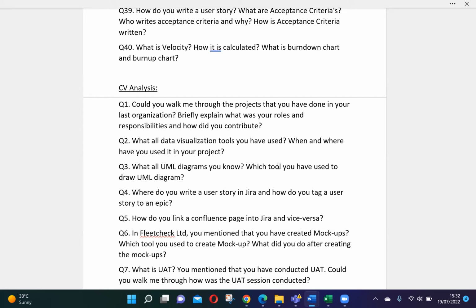Suppose your backlog is ready with 100 user stories, but after a few sprints, customers come up with new requirements or changes, so you update your backlog accordingly. Or, for example, there were 100 features, 50 of them are done, so you update them as done. You always check the backlog on a continuous basis and keep it up to date. That is product backlog grooming. So as the BA, I can do the product backlog grooming with the product owner, isn't it?